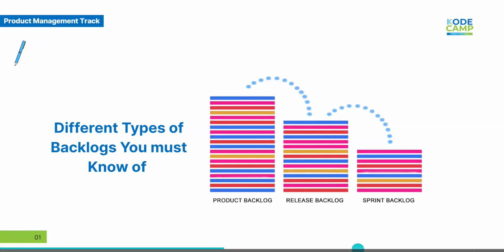And one more thing, try to get estimates. Each action item should have a rough sense of time or effort attached to it, because you're not just trying to calculate hours, right? You just want to know, is this a small, a medium, or a big piece of work, so you know where and how to place it. Because as the backlog grows, these estimates help you prioritize. It also helps you plan your sprint, and it helps the way you communicate with your team.